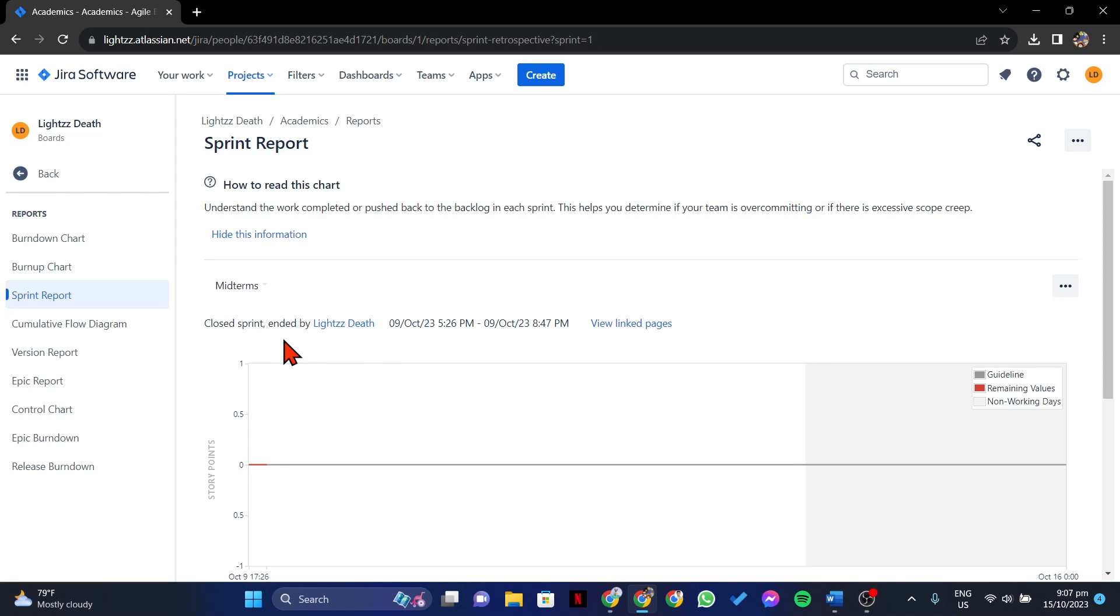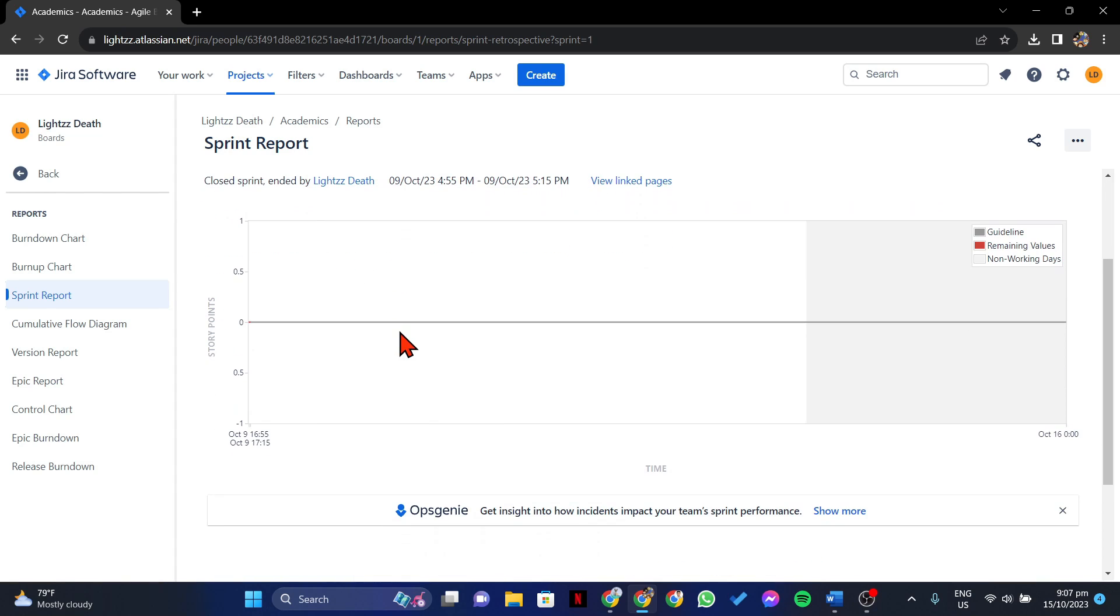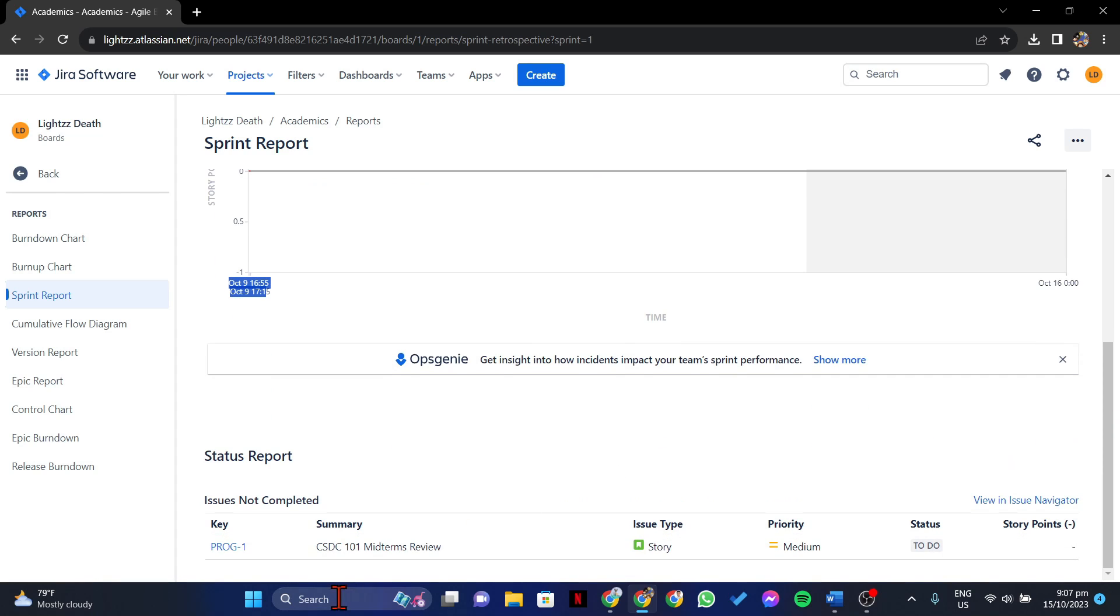This will open the Sprint Details and Summary page. Here, you can view various information, including the Sprint Start and End dates, issues completed during the Sprint, and any associated reports or metrics.